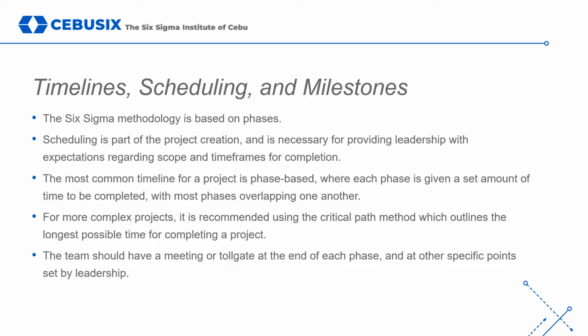The milestone dates are when the team or the black belt will meet with the sponsor to present the findings or results from each phase of the project. Each date gives the team something to work towards. By breaking each phase and each larger task into smaller parts, it's easier for the team to stay on track and complete the work. Smaller tasks seem more manageable, so they are more likely to be accomplished than larger tasks.